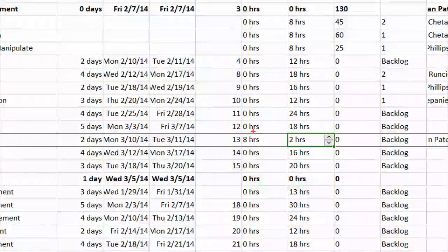Yeah, is it okay? The question is when the actuals come back, where do they go on the task? So if it's a 3-day task, is it kind of peanut buttered from point A to point B? And the idea is we're looking at the actual sync time, where those actuals are going. So it's not going to be loading things in the future with actuals. It can't. It always is from today or back.